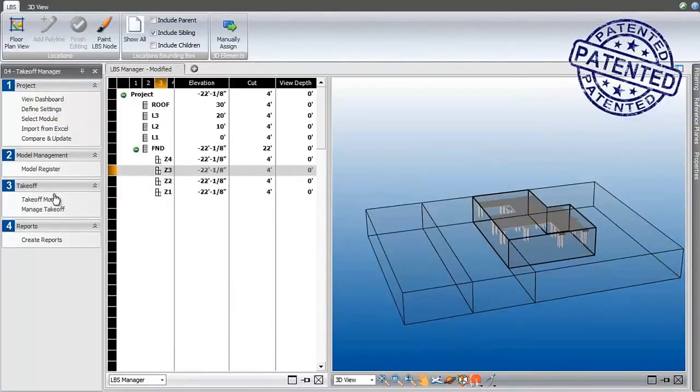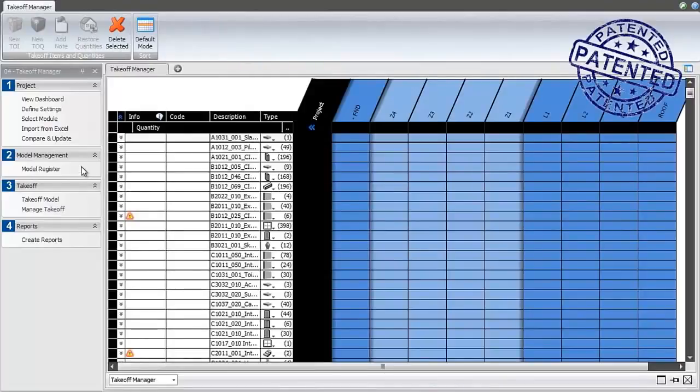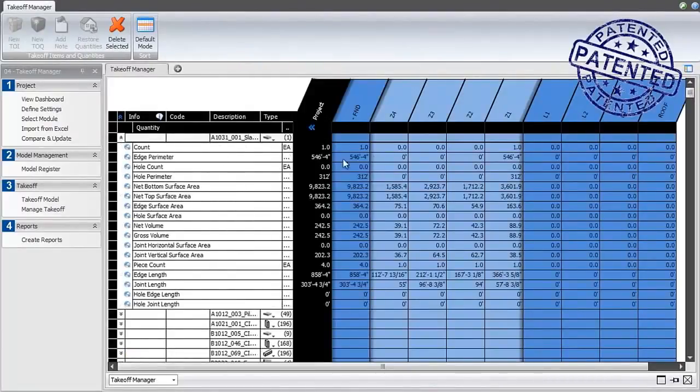It will also recalculate the quantities for each location. We see the 4 zones and the construction caliber quantities now divided into those zones. Quantities per location are the key to integrated virtual construction management.